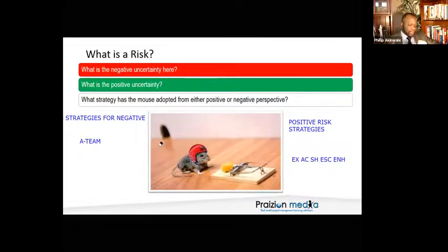You see, if the risk occurs, that is really the punchline. It says time, money, or resources to take advantage of the opportunity if it occurs. So the if is what makes it accept. If you took all that time, money, and resources and you implemented some action before the risk, then it would be a different thing. We would be talking about enhance, or on the side of negative, we'll be talking about mitigate. All right, so read that up. That is really going to help you.